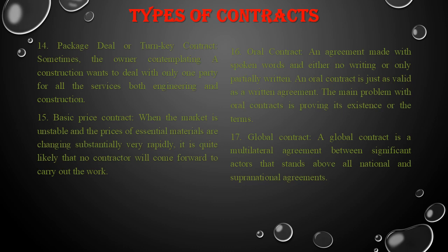Package deal or turnkey contract. The owner contemplating a construction wants to deal with only one party for all the services, both engineering and construction. Such type of an agreement can be termed as a package deal or turnkey contract. Next is basic price contract.